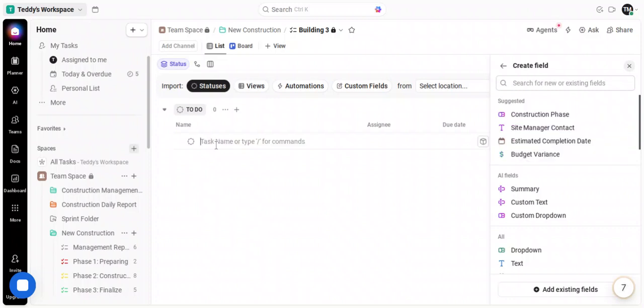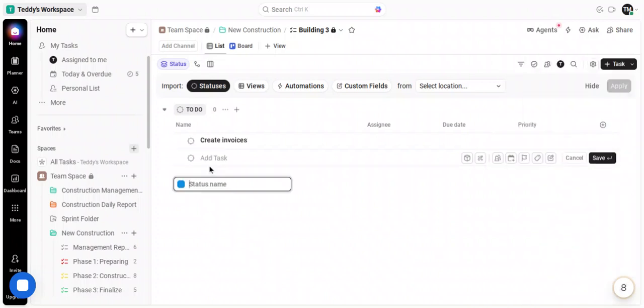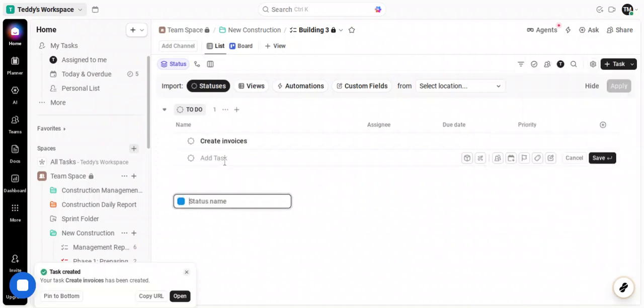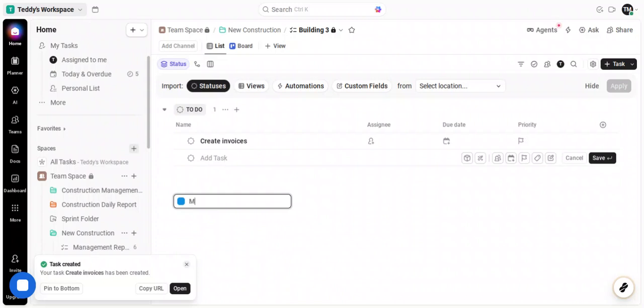Before saving, place the task into a group to keep things organized. Groups act as sections within your list and can represent phases such as To Do, In Progress, and Done, or any logical categorization your team prefers. In the new task window, look for the group selector. If you don't see a group that fits, create a new one that matches your workflow labels, like planning, production, or review. Grouping at the start prevents clutter later, and it keeps related tasks together for easier reporting and filtering.